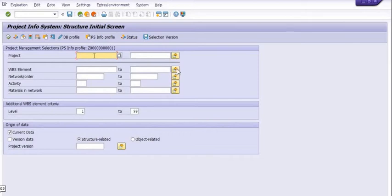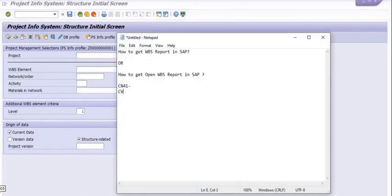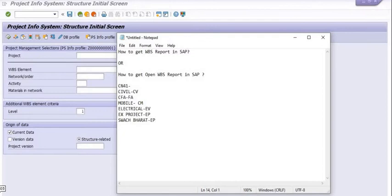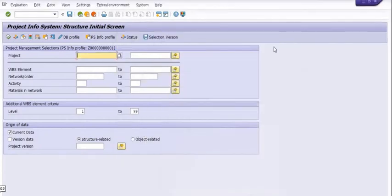If you have a WBS element, you can fill in multiple WBS elements here. If you don't have a specific WBS element, you can filter by category. In our organization — which may differ from yours — civil projects start with CV, CFA projects start with FA, mobile and CM projects start with CM, electrical is EV, external NAMAL projects are XEP, Swachh Bharat projects are EP or SAP, and transmission projects start with TP. Different naming conventions have been created by the CO team to identify the WBS structure.